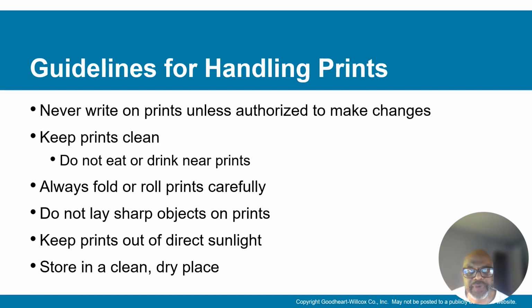Now, here are some guidelines for handling prints. The reason is, I consider prints to be like a legal document once it's signed off on. And it's how that building will be built or was built. And if there is any information needed to follow up or make changes throughout the building process, it will be signed off on again.